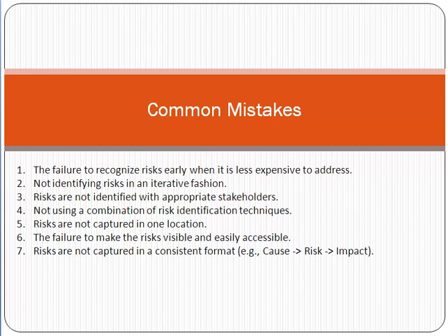Why? Because when you identify the risk at a very late stage, it becomes very difficult to manage that risk. For example, your team needs training because you are working with a technology for which they need it. If you provide the training at a very initial level of a project, it will be better. If you provide it in the middle of a project, it becomes very difficult for the team to first grasp the knowledge from the training and then implement it in the project.